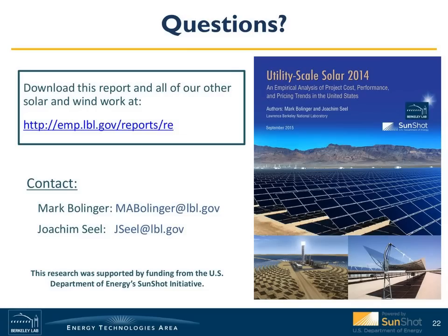There's no doubt a lot of bugs that need to be worked out of that sort of system. You're also dealing with a working fluid in this case, whereas with PV it's more of a solid state technology. And then there have been some avian issues as well at some of these projects, where projects may have gone into standby mode at certain times or been taken offline over avian concerns. So I think there's probably several different reasons why it's taking a while for some of these CSP projects to come up to full speed.